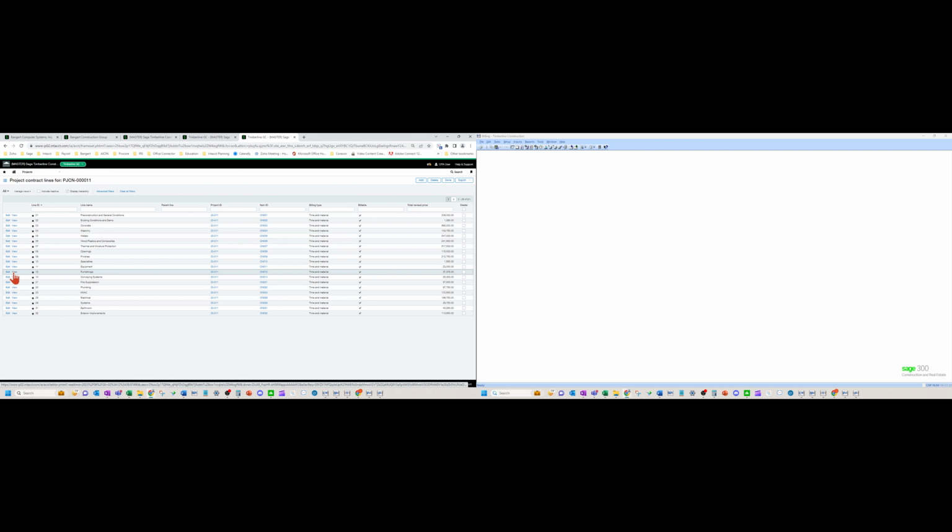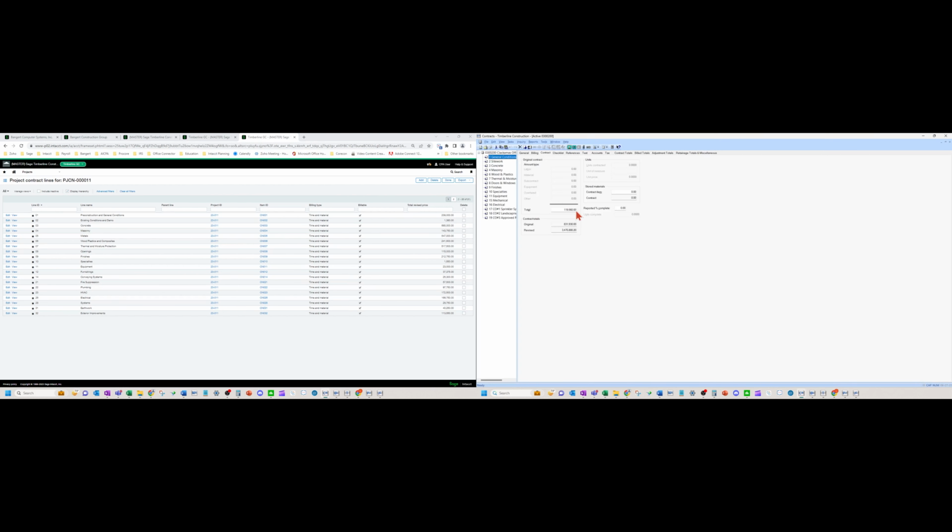There is the Job Central that helps you copy and paste line items in, but you still have to go into the actual contract and adjust the billing tab on these line items to do your rate tables and markup tables and various things that you cannot do with Job Central. So it's a lot harder to get your schedule values in here. Still doable, quite a bit harder.